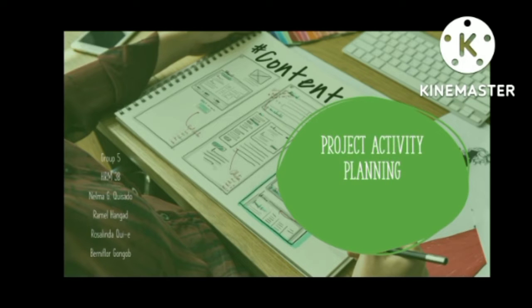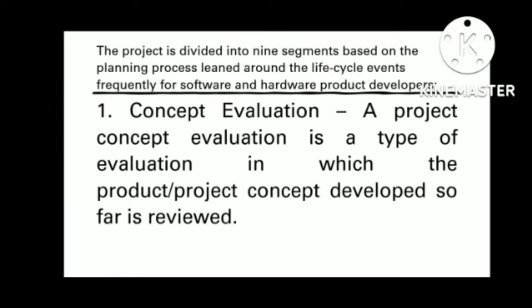It is a lot simpler to plan near-term activities than those happening in the future. In reality, the construction of a longer-term plan is more general in scope, and nearer-term plans are more comprehensive. The recurring nature of the project management process necessitates that plans be continuously supervised during the project implementation and, from time to time, updated after each phase in accordance with the most recent information.